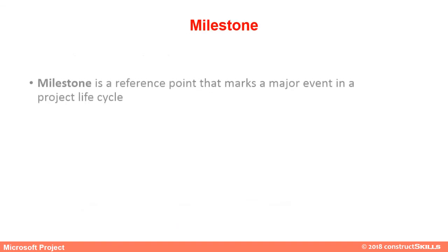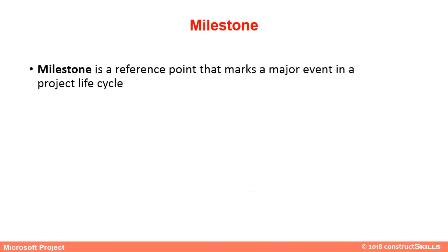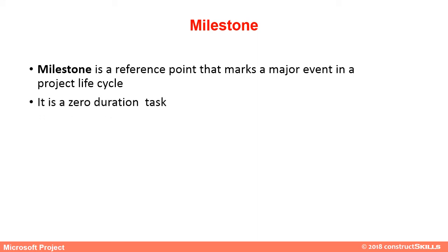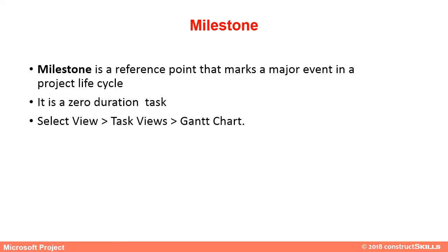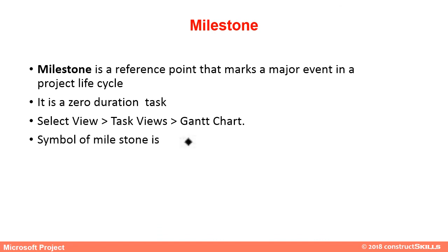A milestone is a reference point that marks a major event in a project life cycle. It is a zero-duration task. It can be added by going to View, then Task Views, and selecting Gantt Chart. The symbol of a milestone is a diamond shape.